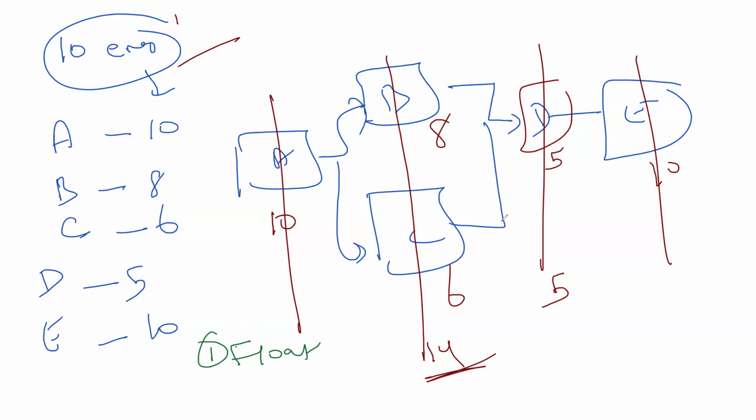Can I move C or D here and there within the float without affecting any of the constraints, the timeline? Can I do that? If the answer is yes, okay, I can put C in parallel of D. C plus D together I need 11, which is much more manageable. I can handle that. So work with the float.